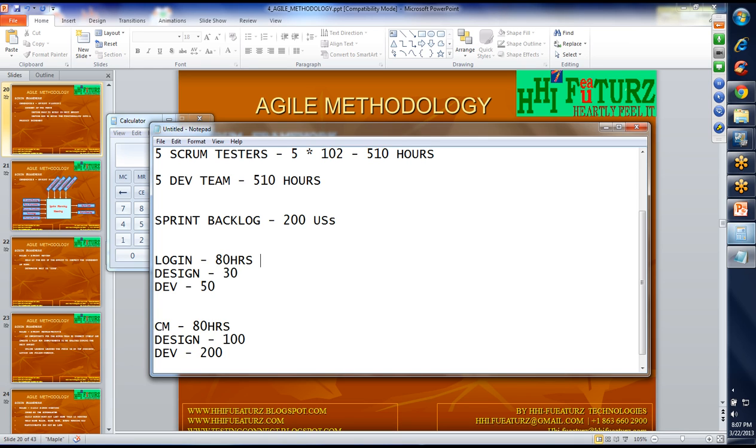For login it is a little bit simple model, right? So 5 points, and a tester is saying 3 points. But say five testers are there, three testers are committing 4 points, and five developers are giving 5 points. At that time they go for either 4 points or 5 points. It's like poker planning. They will ask all team members how many points you have to go for. Like that, based on what most of the team members are proposing, they can go for it. So that is nothing but 8 points for compose mail.